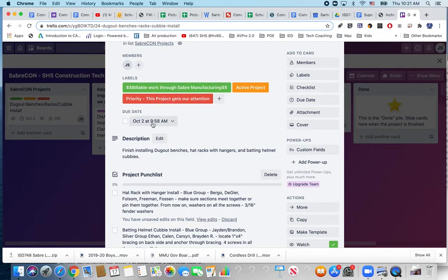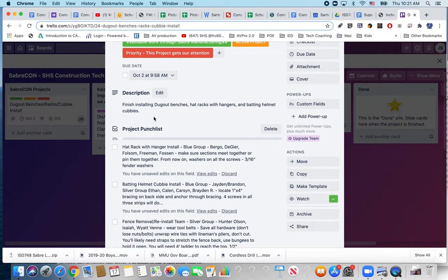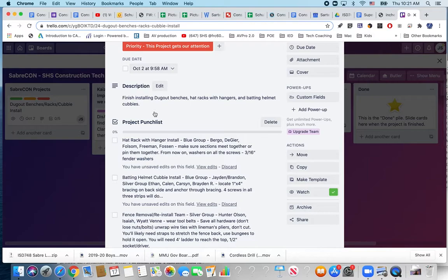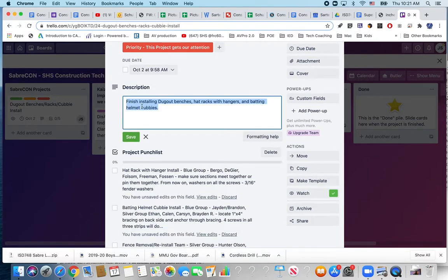The due date is October 2nd. That's the first game is the 5th of October so we want to get it done for sure before then. I introduced you to this already but we're installing the benches, hat racks and batting helmet cubbies. We also need to paint the cubbies.